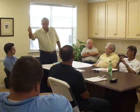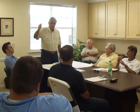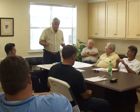The component over here for painting, let's say, his pay request comes to us. We go check it. If he's 30% complete and he claims 30%, then he gets paid. But if he claims 30% and he's only 10%, he doesn't get paid, except for what he's done. So don't send us something that's not done. It's just that plain. If you say you're half done and we go down there and find out you're only 10%, that's all you're eligible for. So just keep that in mind.